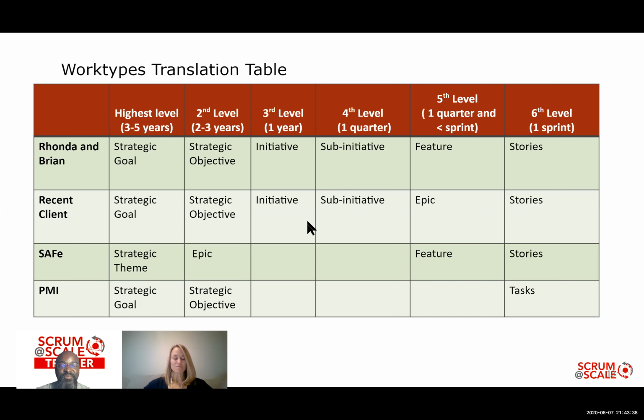So what I mean by that, to go into more detail, if I'm at a team level, teams should not deal with anything bigger than features and epics, because they don't have enough control over items beyond a feature or epic, right? They have control over user stories to do that themselves, and they can actually work with other teams to influence within the meta Scrum how features and epics are actually completed. But they can't control things in other departments and things like that.